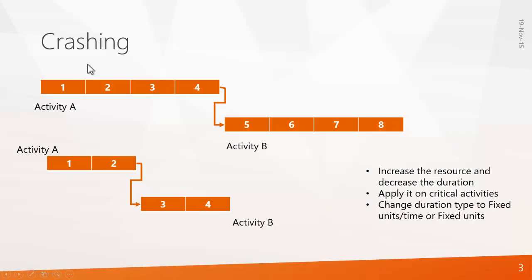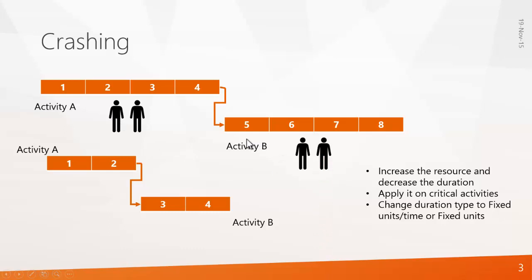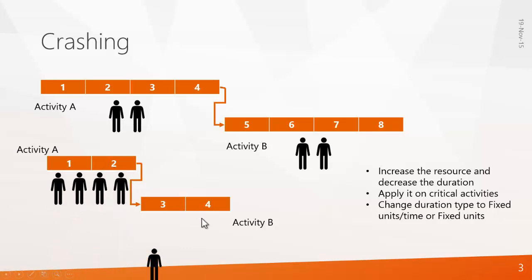The next technique is crashing, which works only on resources. Say there are two activities A and B, each with two masons working on them. If the client asks you to reduce the duration from 8 days to 4 days, you increase the resources from 2 to 4 masons. With 4 masons, the activity duration decreases to 2 days, making the total project duration 4 days. This technique is called crashing.